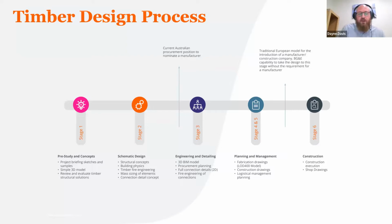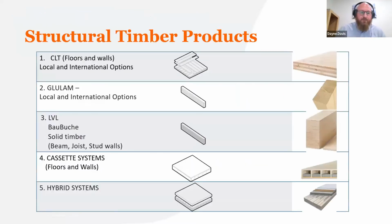And then we also worked with them to put them in contact with a specialist installer, which mitigated the rest of the contingencies, because we found a specialist carpentry installer who was able to take the full risk and contract for the install and management of the coordination, right from the offsite holding yard, getting it to site, and then installing it. So for us, that's how we went about this project, taking risk off the table, working with the full design team to understand not just the structure as an engineer, but all of the peripheral things that influence the architecture and the performance of the building.